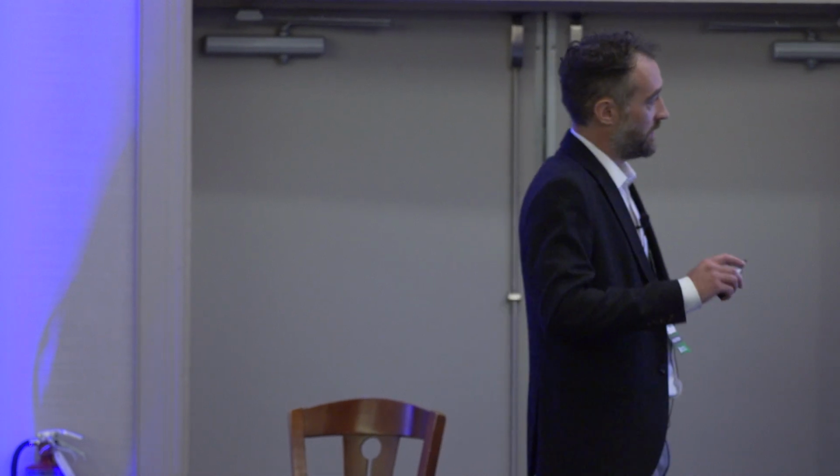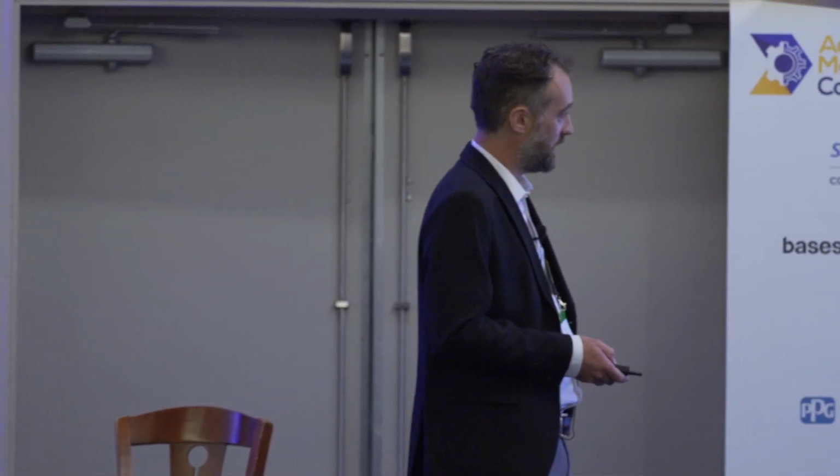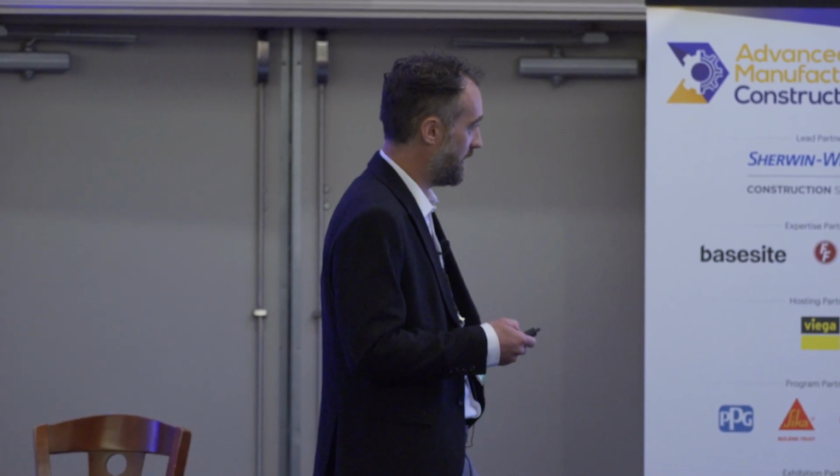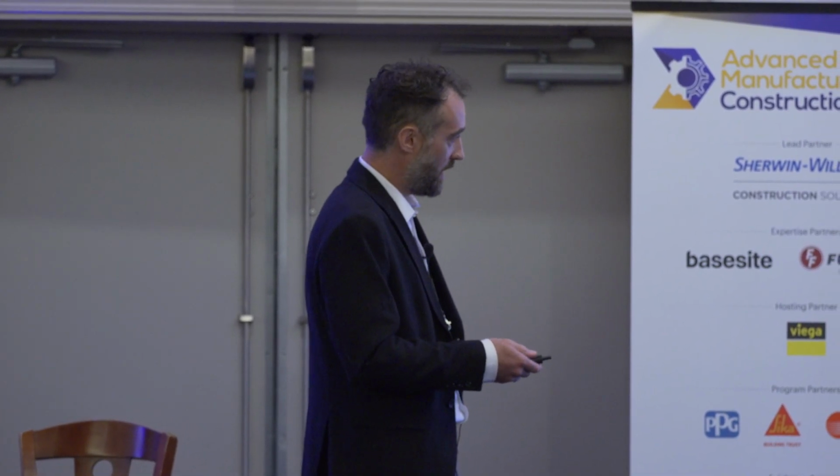Sometimes we get it like that. Sometimes we just get a dump of files from different tool vendors, and they say, good luck, off you go. So we have to take all this and translate it into the scope for the laterals and the electrical and the gas and chemical systems. And this element of scope in terms of the production building is about 30% of the cost.